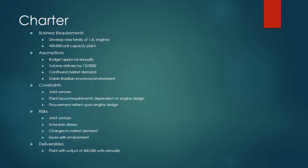Risk: the joint venture itself was also a risk, as at any point one party could walk away, which would be critical since they split the funding 50-50. Schedule delays are also always a risk. There could be changes in market demand. And any issues with the environment such as weather or political instability. The final deliverable was building a plant that had an output of 400,000 units annually.